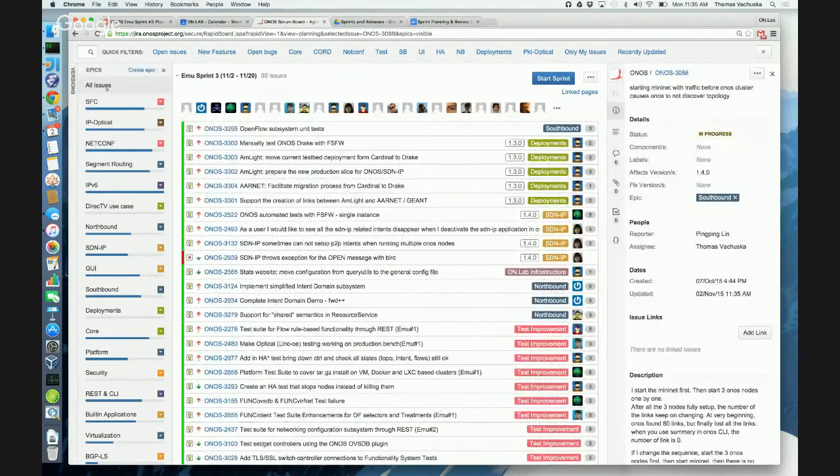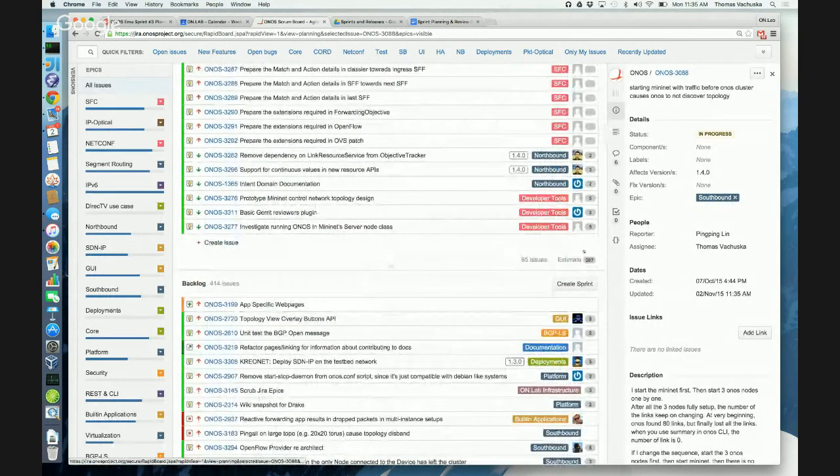Okay, so if you were to take a look at all the issues in a sprint and now take a look at the big, okay, 207 points. That's about on track with what we've been doing before at the start of sprint. So I guess it definitely seems to overshoot, again, by about 40% of the capacity that we're supposed to have. So I'd say offline, let's talk about the Scrum teams and who's responsible for different areas, because as you go through each epic, when you look at the team sizes, it seems like it should be fine. Yeah, so let's leave it like this.